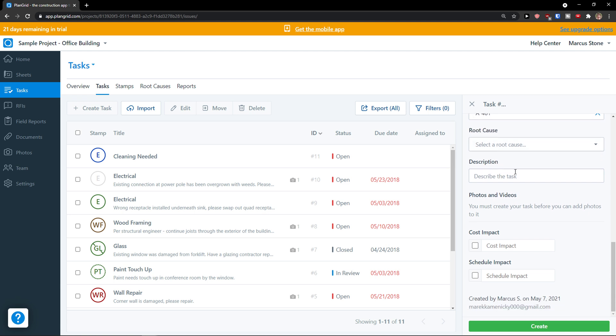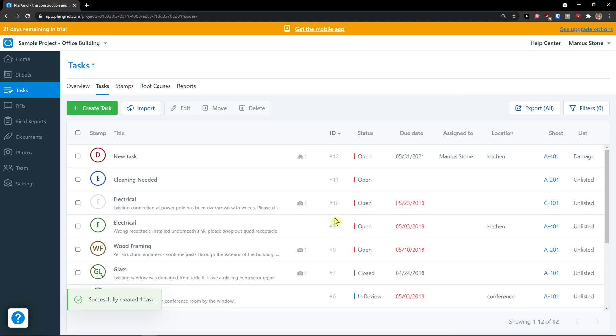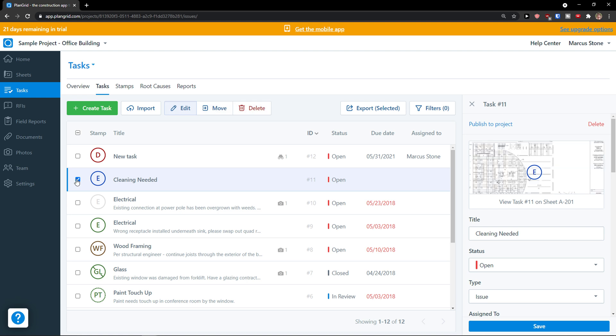Then we're going to see the root cause, a description, and then we have cost impact here and schedule impact. Let's click create. And voila, here we have a new task.